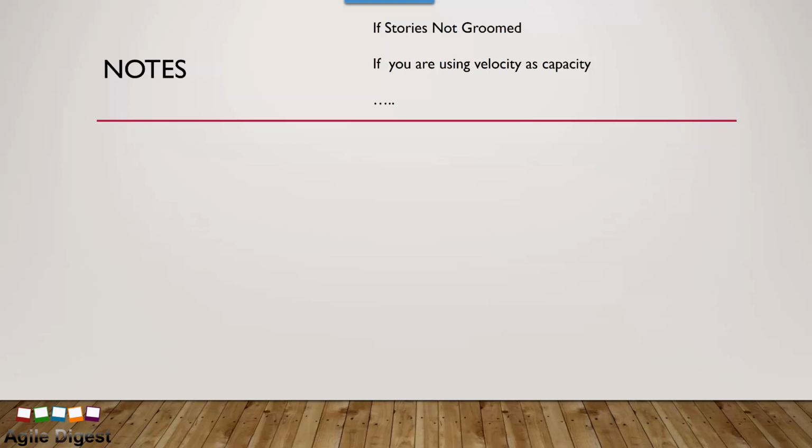Story points are good for individual story sizing, but when you are doing capacity planning, it has to be in hours, so that you can measure how many vacations you had, how many team members you have, and many other areas to get the real hours available and the task hours needed and match that.